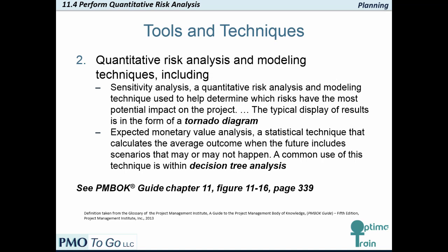At the end of each line, consider the results. If the result of taking that decision is uncertain, draw a small circle, chance node. If the result is another decision that you need to make, draw another square, a decision node. Squares represent decisions, circles represent uncertain outcomes, usually more decisions to make. If you have completed the solution at the end of the line, put a triangle, end of branch.